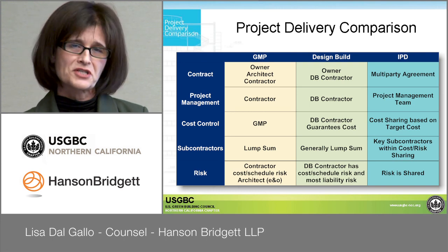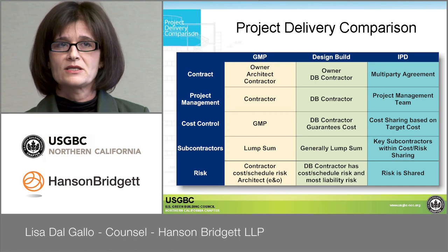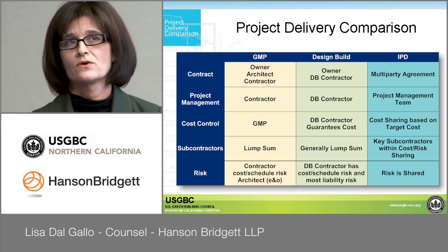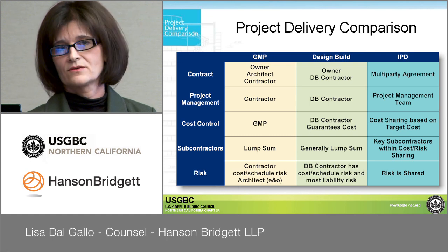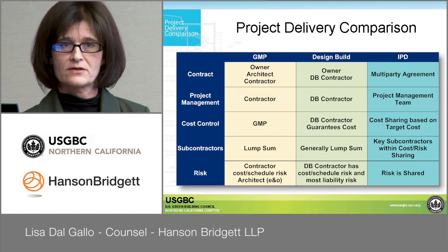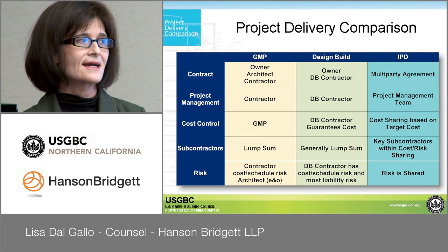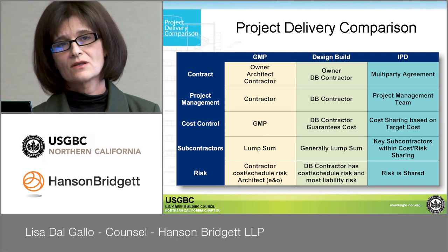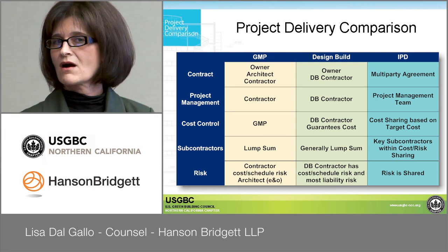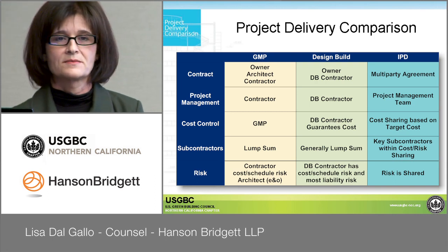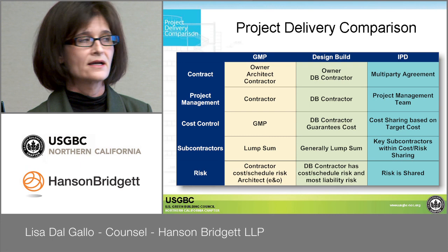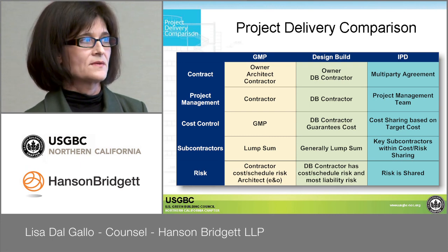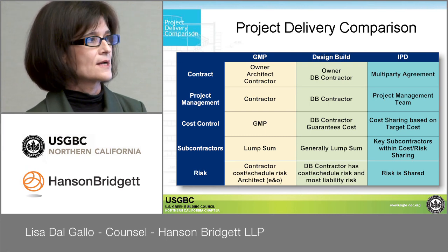The subcontractors are generally lump sum under design build, but you can have situations where they will subcontract with the MEP directly, so they won't have a mechanical and electrical consultant. They would just hire subcontractors to do the design work. And in that case, under design build, a lot of times those people will be on more of a cost reimbursable basis, similar to how the contractor might contract. Everyone else, of course, would be lump sum, or everyone can just be lump sum.